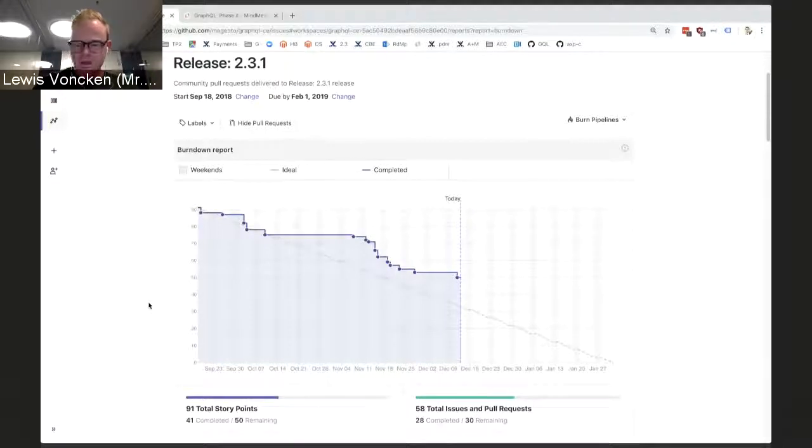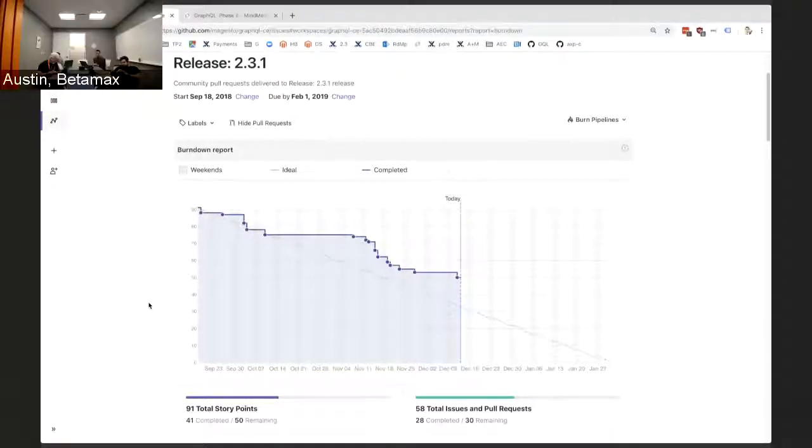So no, like I said, we won't know the exact dates for a long time. This is kind of an educated guess for when development will wrap up. And so what that means is, past that point, we will still have to go through a bunch of testing iterations and regression and basically a stabilization period of time, which will also be unknown.